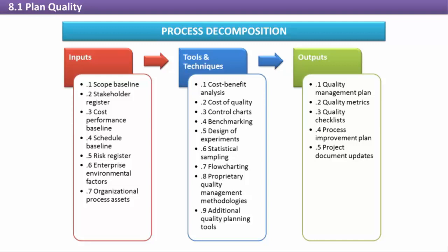Quality metrics are the specific quality goals the project must meet and how the quality control processes will confirm compliance. Quality metrics can include any type of applicable measurement, including defect rates, bug rates, failure rates, uptime, reliability, and coverage area.